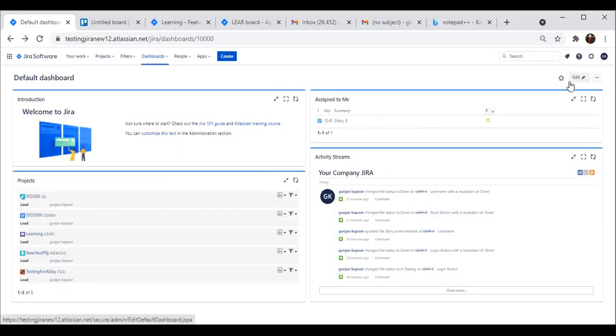In our project, how we created the dashboard is one at the release level. It will have the status of the epics, stories, tasks, subtasks, all those issue types. The second one is the execution statistics, which will have the execution related information. And the third one is on defects. So we used to have 3 dashboards, in one screen only, and we can drag and drop the reports wherever we want.